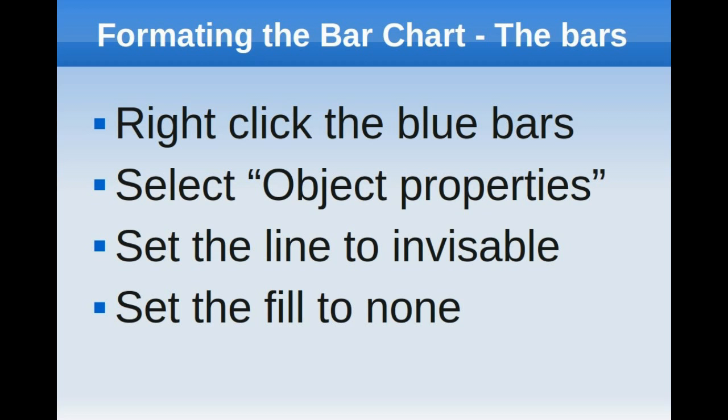Now it's time to format the bar chart so it looks like a Gantt chart. First, right-click on one of the blue bars, select object properties, and then set the line to invisible and select the fill color to none.